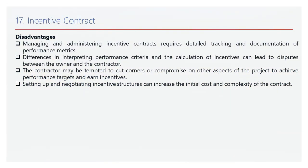Incentive contracts can drive performance and efficiency, but they also come with disadvantages. Complex management: managing incentive contracts requires detailed tracking and documentation of performance metrics, adding administrative complexity. Potential for disputes: differences in interpreting performance criteria and calculating incentives can lead to disputes, affecting timelines and relationships. Risk of cutting corners: the contractor may be tempted to cut corners to achieve performance targets and earn incentives, which could impact overall project quality. Higher initial cost and complexity: setting up incentive structures can increase the initial cost and complexity of the contract.